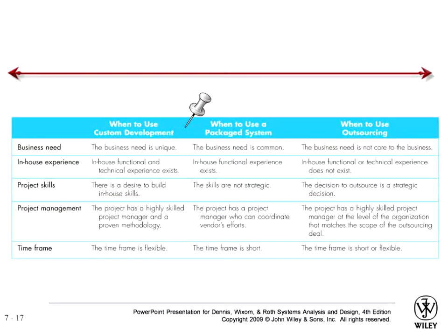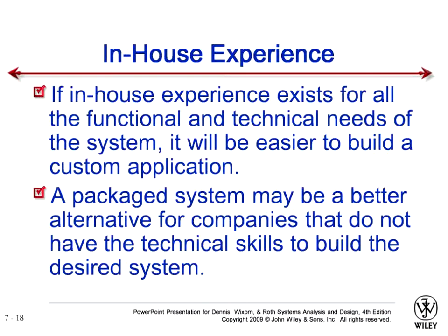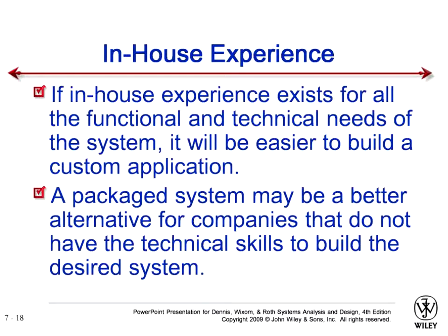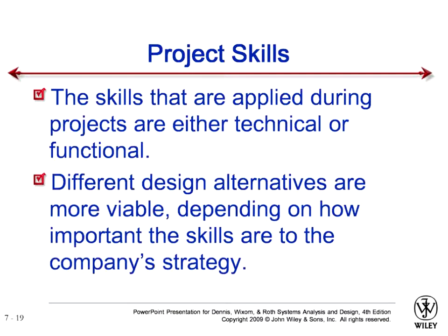Then selecting an acquisition strategy is also important. If we talk about experience in the selection of an acquisition strategy, what is in-house experience? If in-house experience exists for all the functional and technical needs of the system, it will be easier to build a custom application. Whereas a packaged system may be a better alternative for companies that do not have the technical skills to build the desired systems. So in terms of in-house experience, these are the two options.